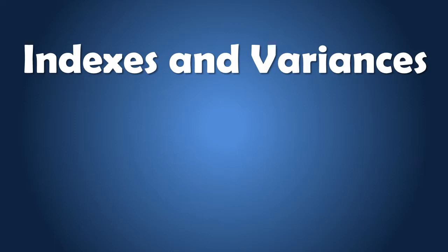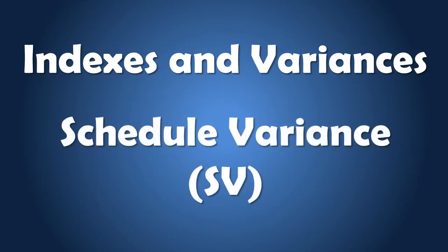For the control schedule process, a project manager will use the schedule variances. The schedule variance is the difference between the amounts budgeted for the work done and for the work that has been planned. Schedule variances show if and by how much the project work is ahead or behind the approved schedule.